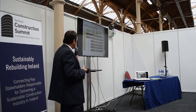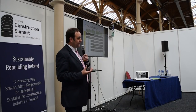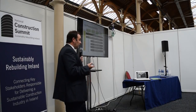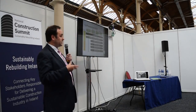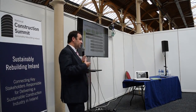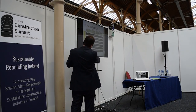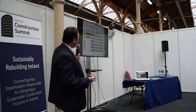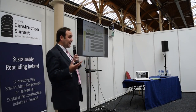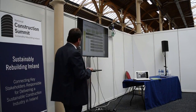facility itself. So an addition for version 4 is that there's an operation and maintenance plan, and a lot of these are now becoming soft plans, which are linked to the operations CAFM programs, or the computer-aided facilities management. So the guys who are actually maintaining the equipment have the key information right at the plant. Again, for enhanced, throughout the life of the project then, there's a 10-month review, seasonal recommissioning, and a final systems manual is commissioned. And then, as I said, there's this ongoing commissioning plan for critical facilities that need to be commissioned through the process.